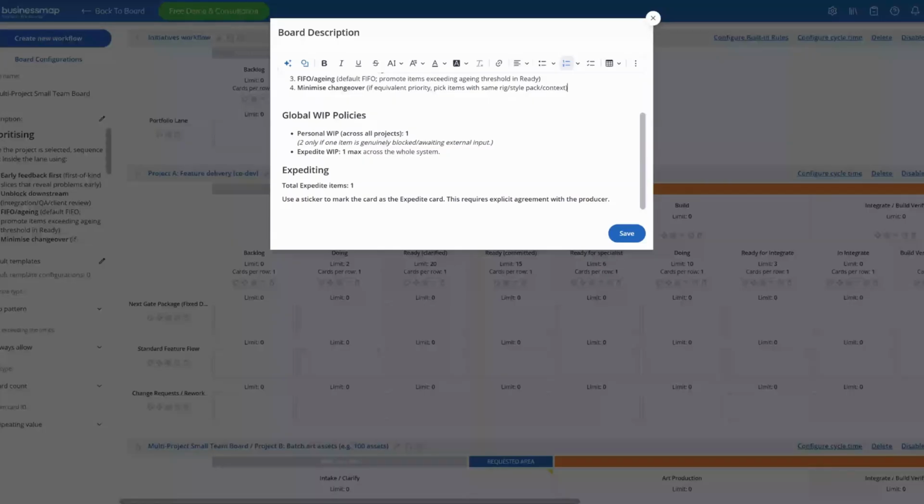Expedite is when you throw everybody a problem. Like something terrible's happened, everyone stops and works on that thing. Often you don't need everybody, but that is the point of Expedite. Client's going to sack us or just about to lose this big piece of work. Everyone needs to drop what they're doing and do this thing. You only do it one card at a time. You don't just use it to charge work through quickly because it will crush your flow. Only use it when you absolutely must.